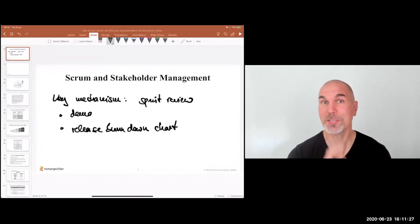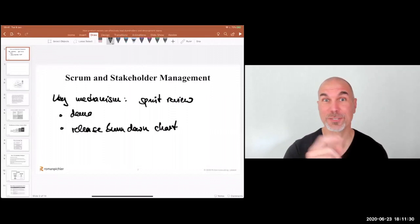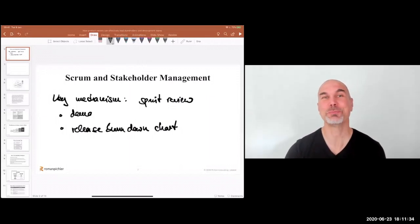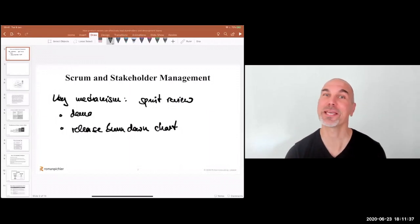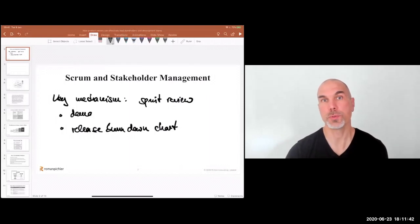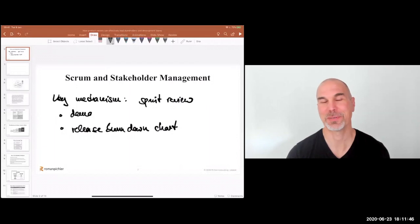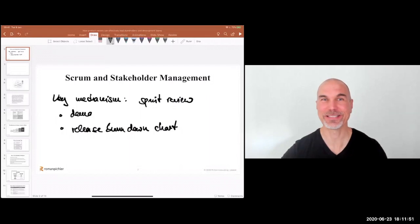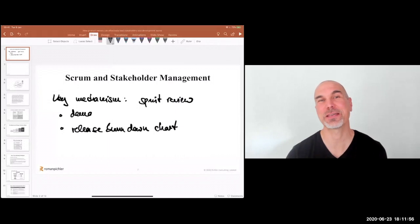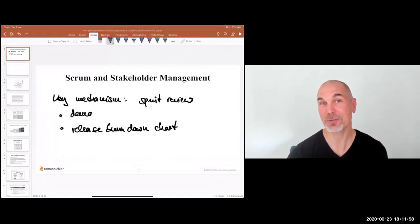If you're interested and if you can contribute, that's wonderful. In fact, you expect stakeholders to show up, to be at the review meeting, and to offer constructive feedback and their perspective. So instead of pushing out reports to stakeholders that either get ignored or escalated, Scrum says: let's invite the stakeholders, bring them into the process, meet at the sprint review meeting, and hear those concerns, ideas, and perspectives and discuss them.